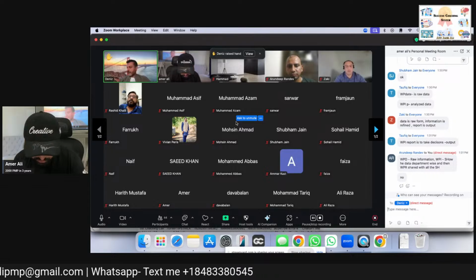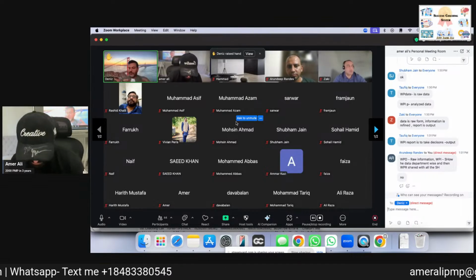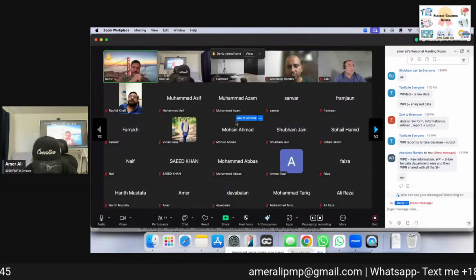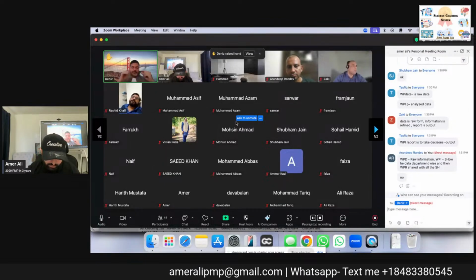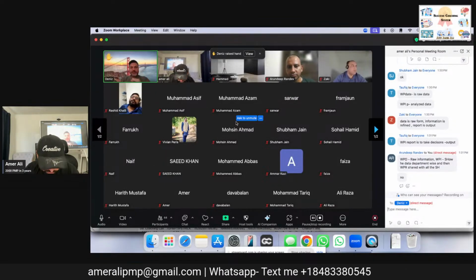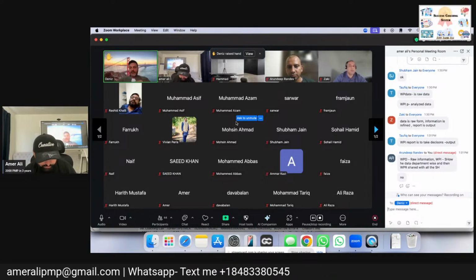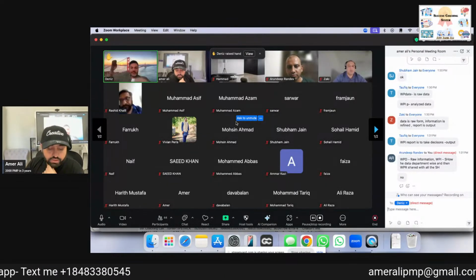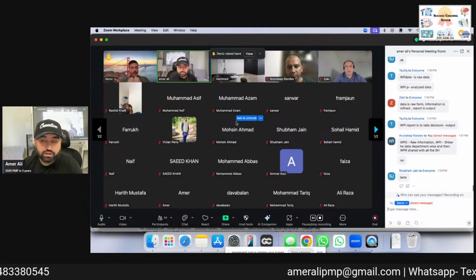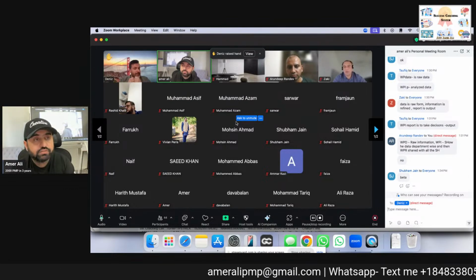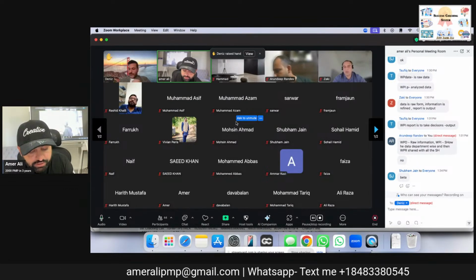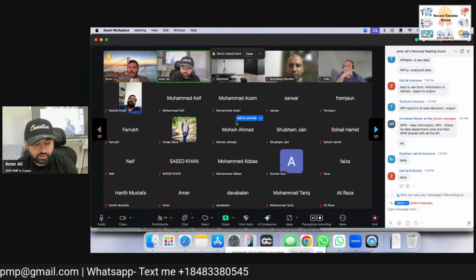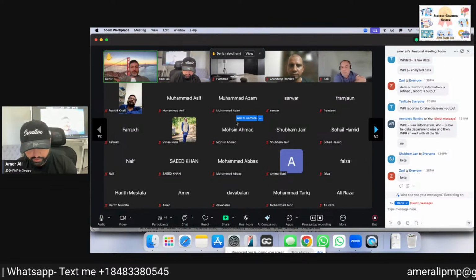My question is, you asked before about the three-point estimation types when it's not mentioned in the exam. My son just came in. What do we use there? Is it the beta or the PERT estimation when it's not mentioned, or the standard one? Depending on the requirement, what do we need? If it is not mentioned in the exam, you will use beta or PERT. Okay. Thank you.